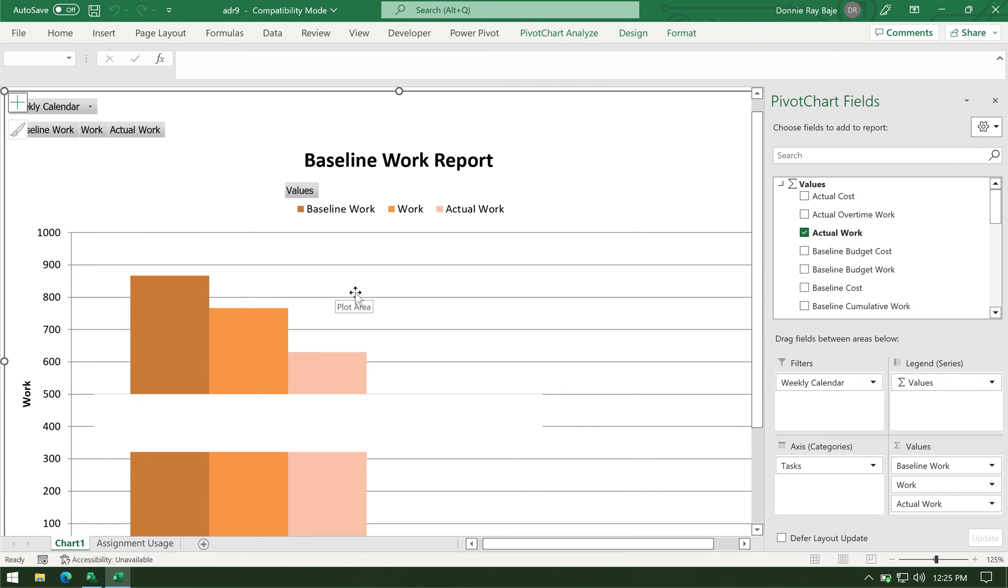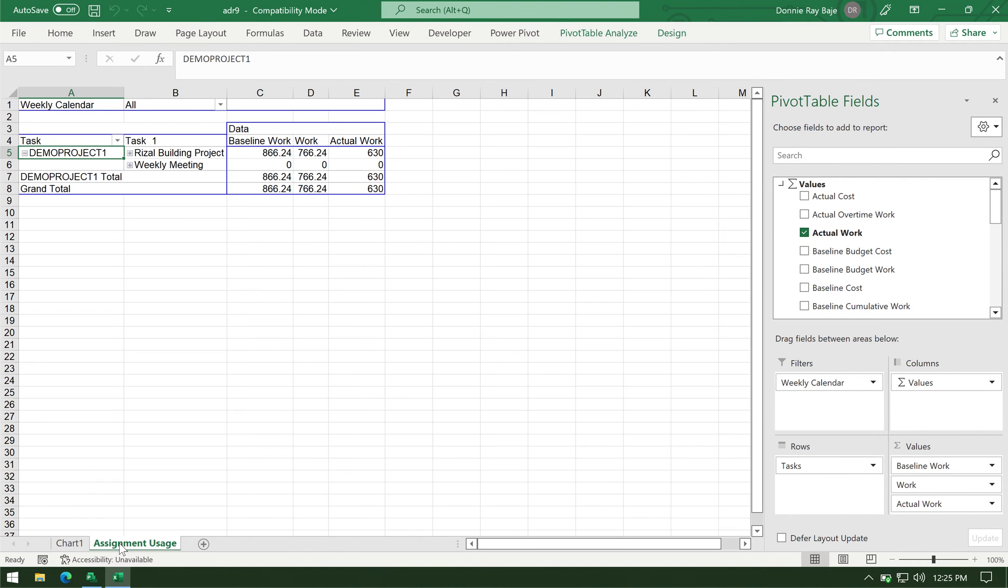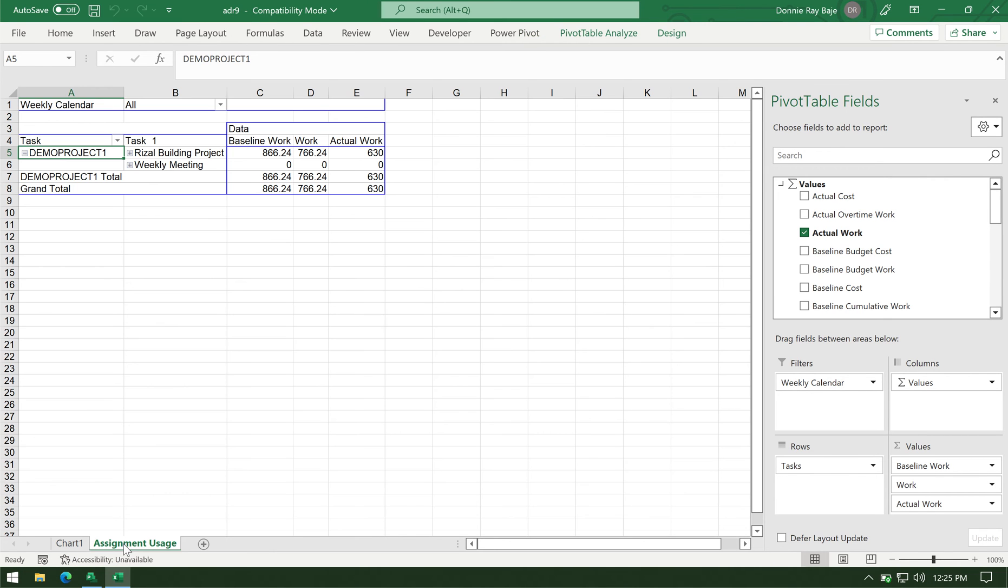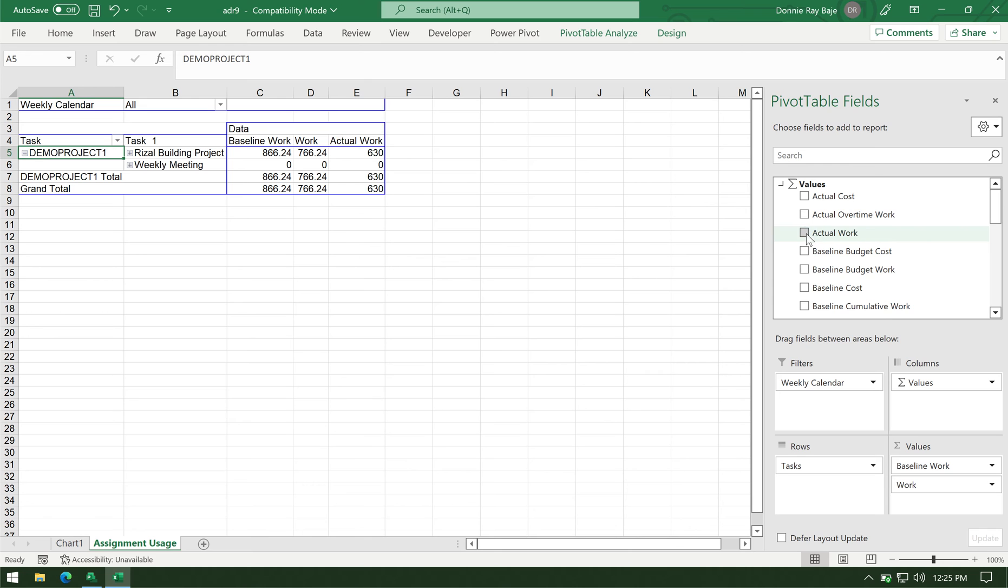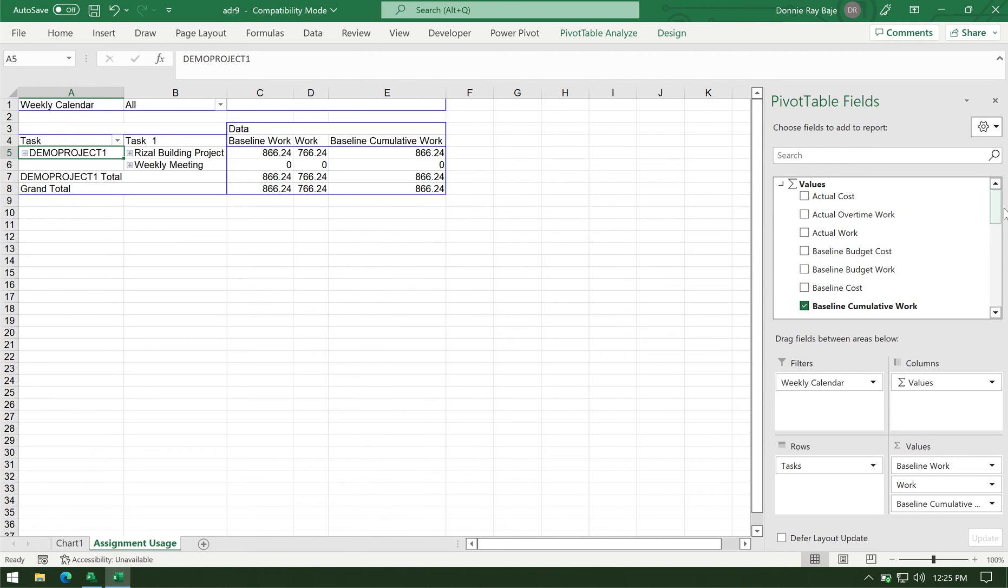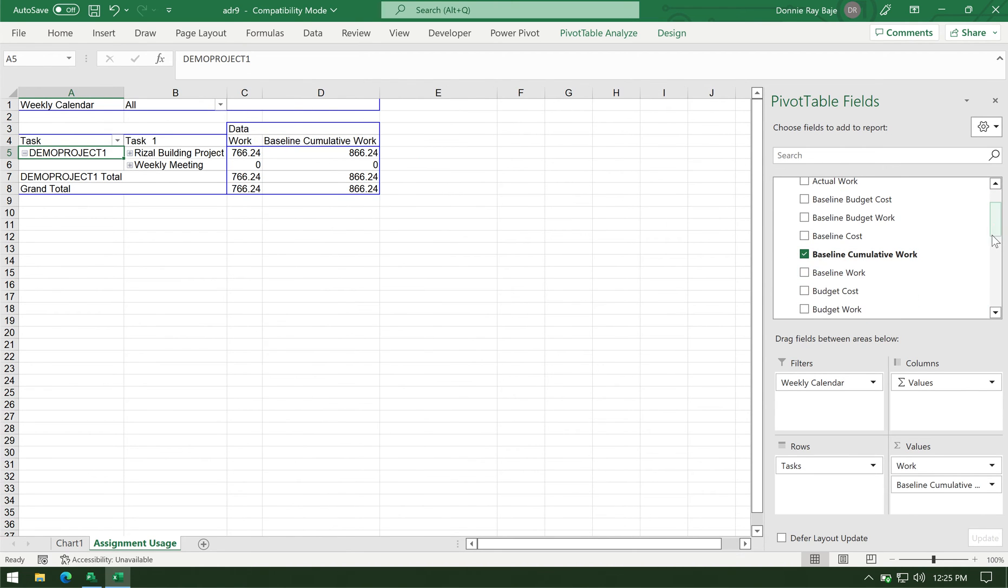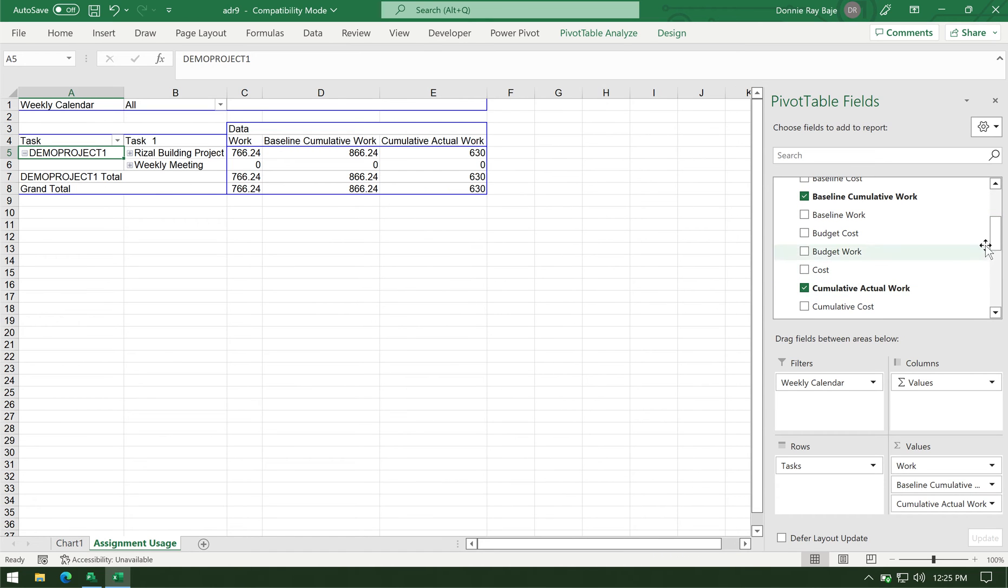It will have the chart, which actually you cannot use yet. You have to still modify some things. You have to go to the assignment usage tab, which is where you will see a classic pivot table used by this chart. So we have to go to the pivot table and we have to remove the fields, the values that it added. Because remember, we don't need the actual work. What we need is the baseline cumulative work.